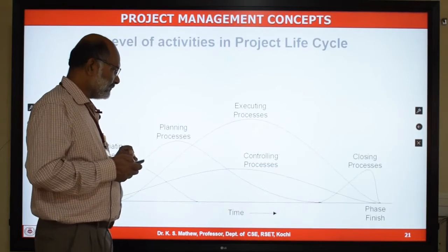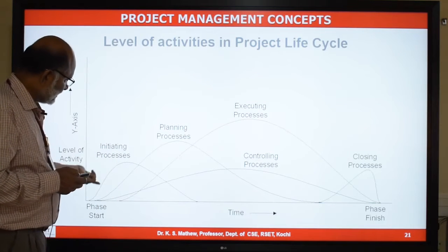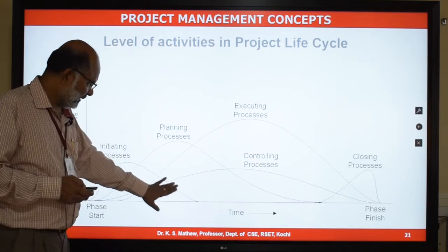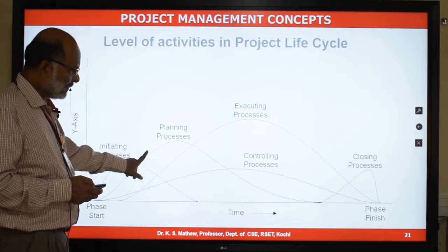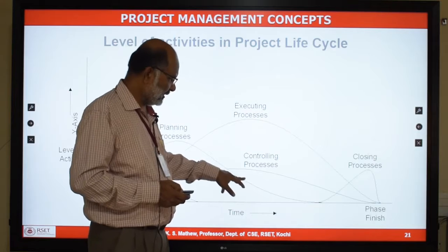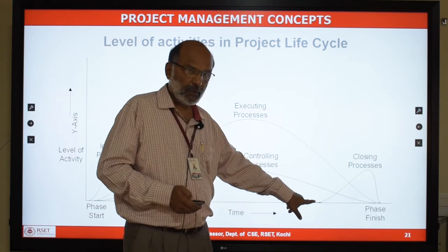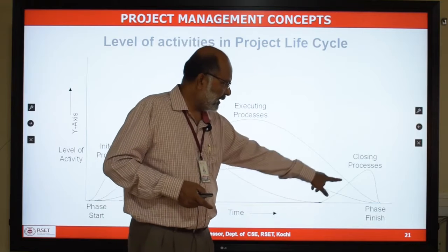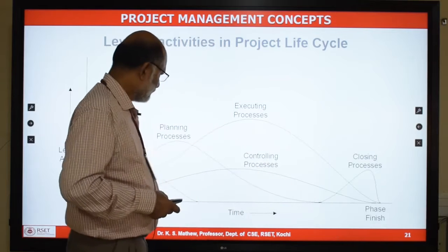Now let us look at the effort involved in various phases of this project management life cycle. So you start with initiating processes. The effort in initiating processes will be higher in the beginning of the project and it will be over after some time. But as soon as you start initiating the project, you also start planning processes, which is high in the beginning of the project, and the effort reduces, but it continues till just before your closing process. You need to keep on planning, replanning, and changing your plan continuously till nearly the end of your project, just before starting the closing process.